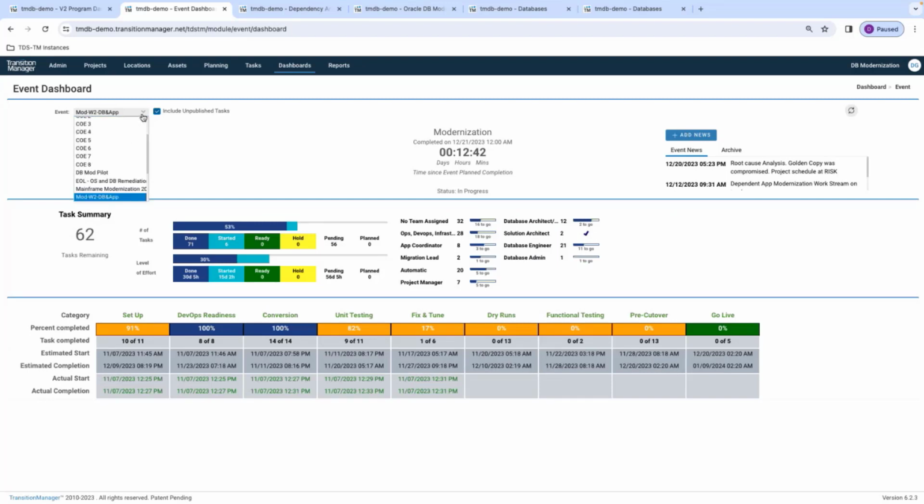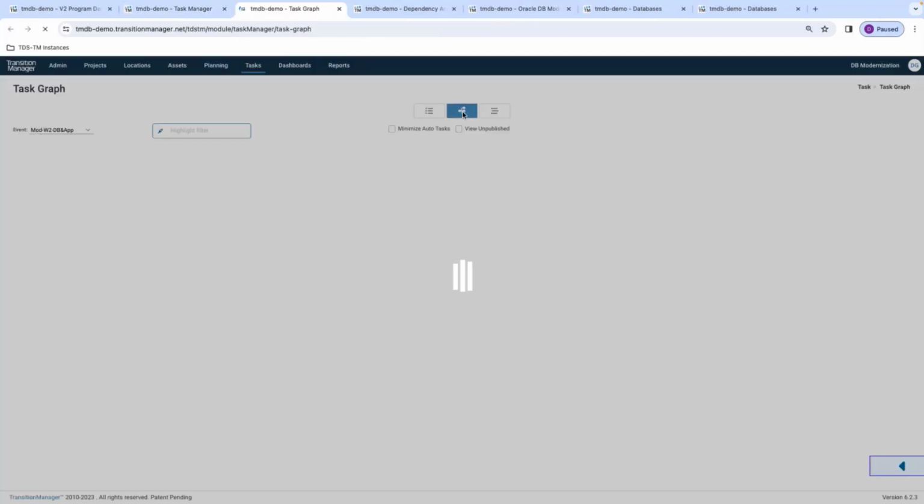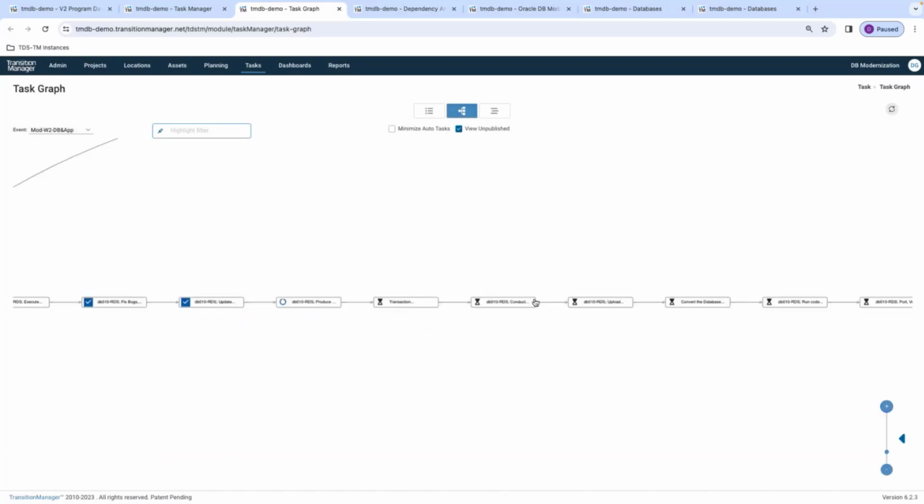But if you saw, as I pulled that up, we have lots of other types of activities going on at the same time. And so you'd have that optimize and tune. And so what's happening here is this is a codified way to generate all of the tasks based on the data and the metadata and the criteria involved here. So for instance, if we know that this is a Cat 2 and we know it's going to have 2 cycles of tuning and a conversion with it, it's going to auto apply and come up with what we call our task graph. I'm just giving you a high level, but it's a large concept that you're going to have these things auto-generated for lots of different examples, with your critical path, and it's going to manage the whole process.